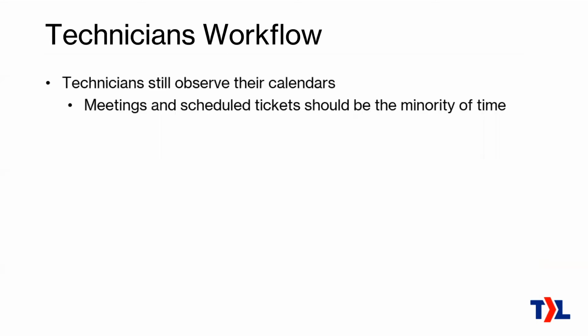So I'll say again, the technicians still observe their calendars, because they are going to have some meetings and they are going to have some scheduled tickets. But the difference between what we're doing now and something like the Tetris scheduling method is that in the Tetris scheduling method, most of their day is booked out. Even 100% of their day is booked out with meetings and scheduled tickets. So there's no other way to do any work there because their whole day is scheduled.